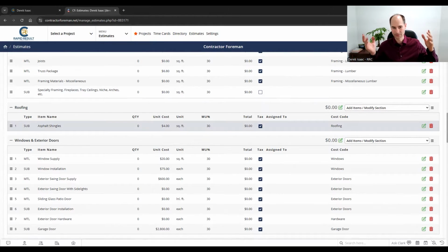Typically, most homes, asphalt shingles. If you've got some sort of solar panels or other things, that's probably going to go in the electrical, but add the extra stuff in there. One thing you could do for roofing is have an allowance for the type of material if you wanted a separate labor and material price because they may want upgraded shingles. I would typically just say this is base standard pricing for standard shingles. If you want upgrades, that would be more, or whatever.